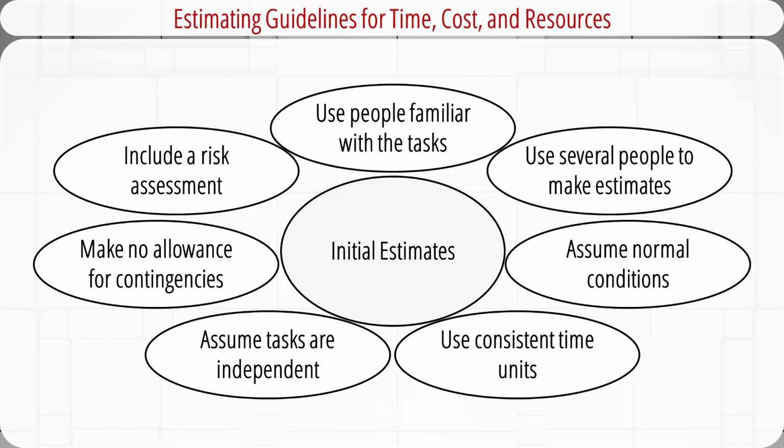Similarly, if the normal workday has 2 shifts, the time estimate should be based on a 16-hour workday. Fourth, in practice, the use of workdays is the dominant choice for expressing task duration. However, in small or mini projects, hours or even minutes probably would be more appropriate as a time unit.